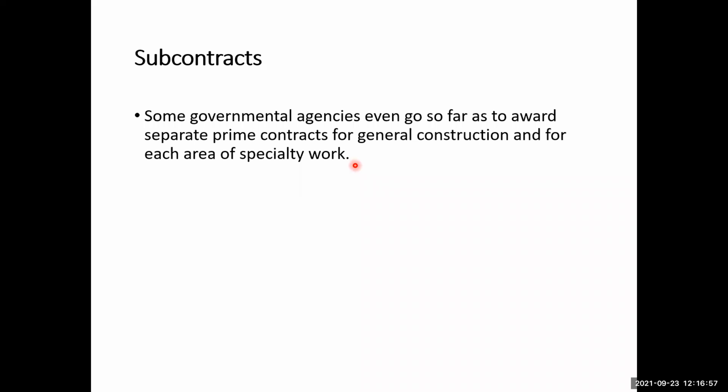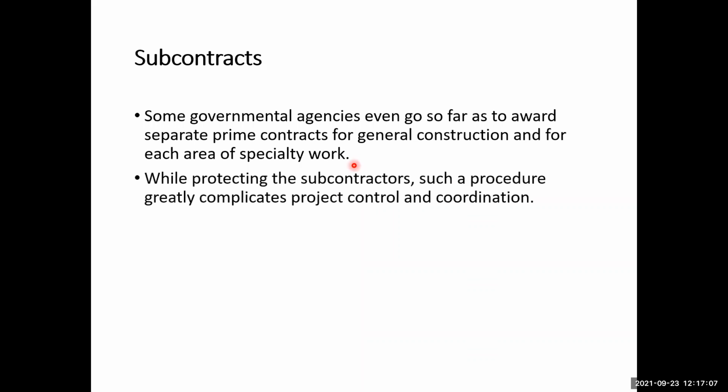However, in this type of situation, there will be a greater headache for the owner to manage the works of various subcontractors. So while protecting the subcontractors, such a procedure greatly complicates the project control and coordination.